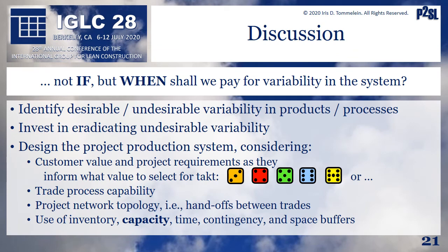So really, you'll say, who wants to pay for standby capacity? Well, cost is an output metric. From an operations science perspective, we know that when there's variability in a system, you will pay for it. It's not if, but when you will pay. A production system must therefore be designed to make variability visible, as I've done here by focusing on process capability and highlighting when it falls short of expectations. When expectations are not met, standby capacity is used. This use signals that the process capability has variability to drive out. Over time, when less standby capacity is needed, the system will become more stable, and this will likely lower the cost.